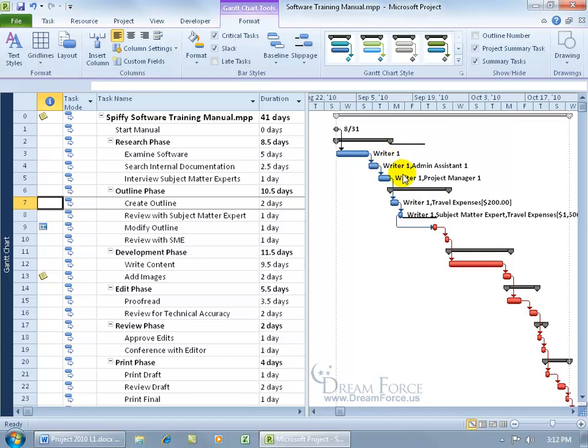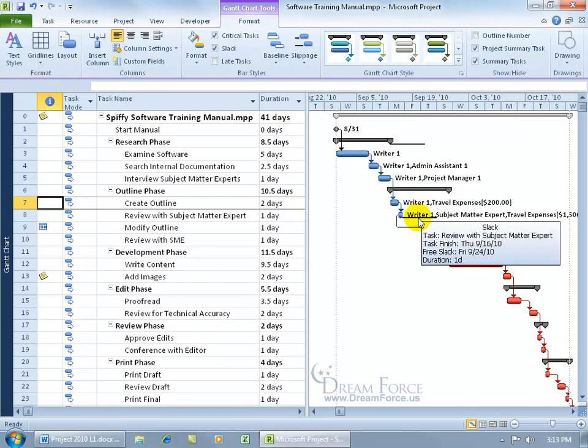So all these tasks, we can push out until the 21st. After that, if we go to the 22nd, then it's going to become critical. And you can see we've got one down here for this task. It says it's got free slack until the 24th, after which it's going to become critical. I can try to figure this out in my head how many days that is, or better yet,